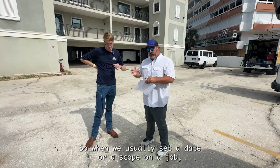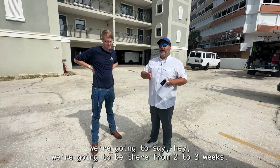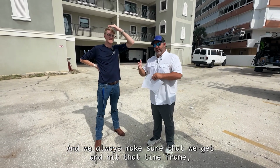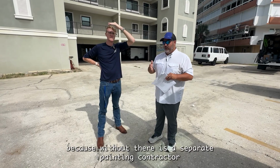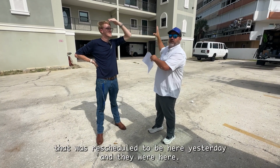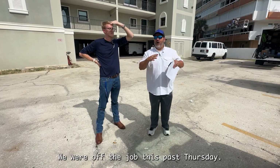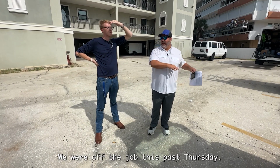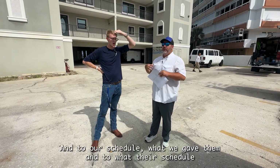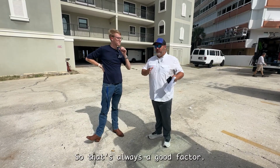When we usually set a date or a scope on a job, we're gonna say, hey, we're gonna be there from 2 to 3 weeks. And we always make sure that we hit that time frame, because there is a separate painting contractor that was already scheduled to be here yesterday, and they were here. We were off the job this past Thursday, so it worked out absolutely perfect onto our schedule, what we gave them, and to what their schedule is to do the painting. So that's always a good factor.